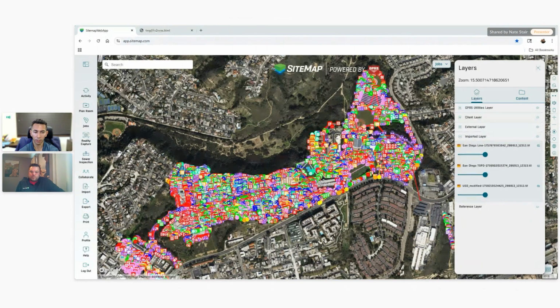And when I came on, I noticed that some of these as-builts that we were using, at least the one that would show basically a single line of the different major underground utilities that we have on campus, were a bit dated. They were from 2013. So several new buildings had come online after that, as well as there are always slight shifts, where you'll do one project and you'll potentially have to move a line that isn't necessarily tying into the project you're working on, but is just make-ready work to get your project going.